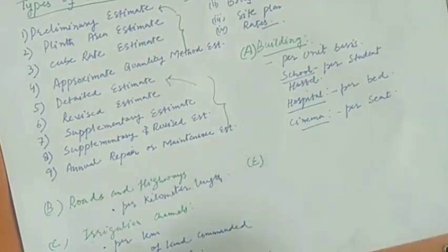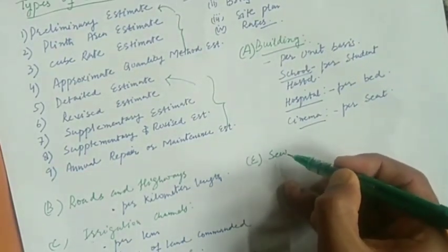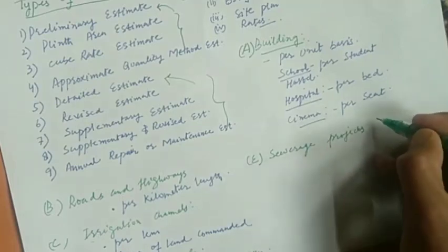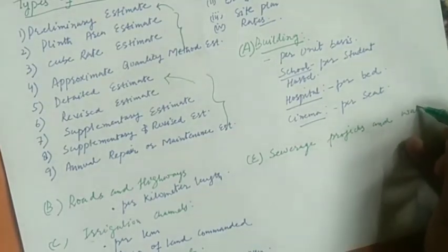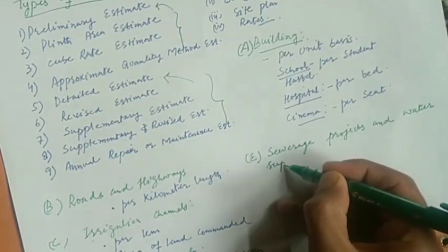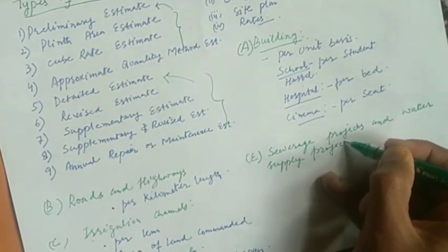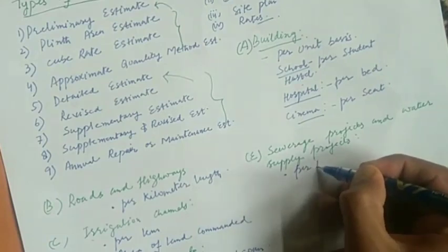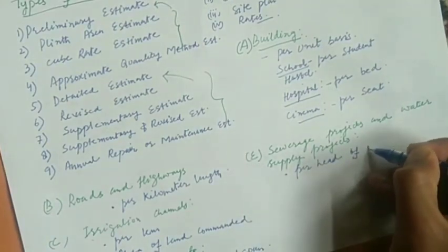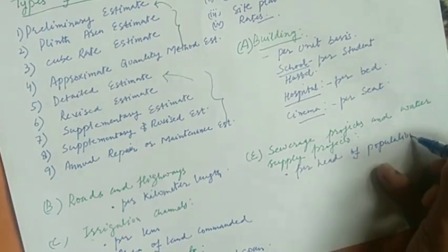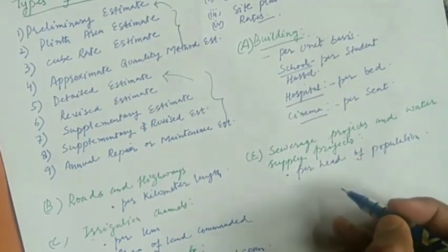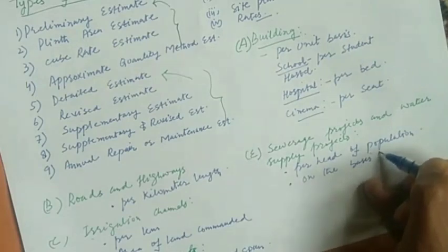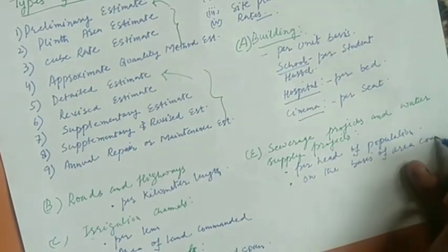Similarly, if we have to prepare an estimate for sewerage projects and water supply projects, it will be made on the basis of per head of population, or on the basis of area covered.